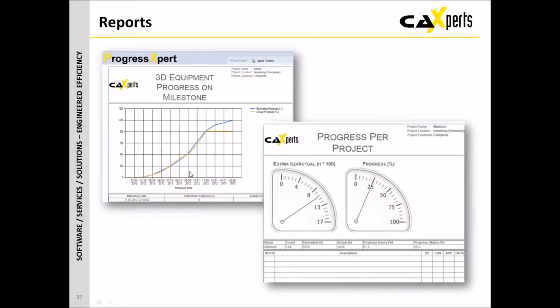The end result of that is that we can then start looking at various reports. For example, we might see an S-curve based on the disciplines or the overall project, or broken down by units, areas, systems, individual tag items if you really wanted to. So we've got the data, we can slice it and dice it to look at it any way you like. This other graph down here is basically showing the man hours versus progress. What we really want to see is equivalent or more progress than we've used man hours going forward. But again, as I said, you can represent the data in any different way you like.